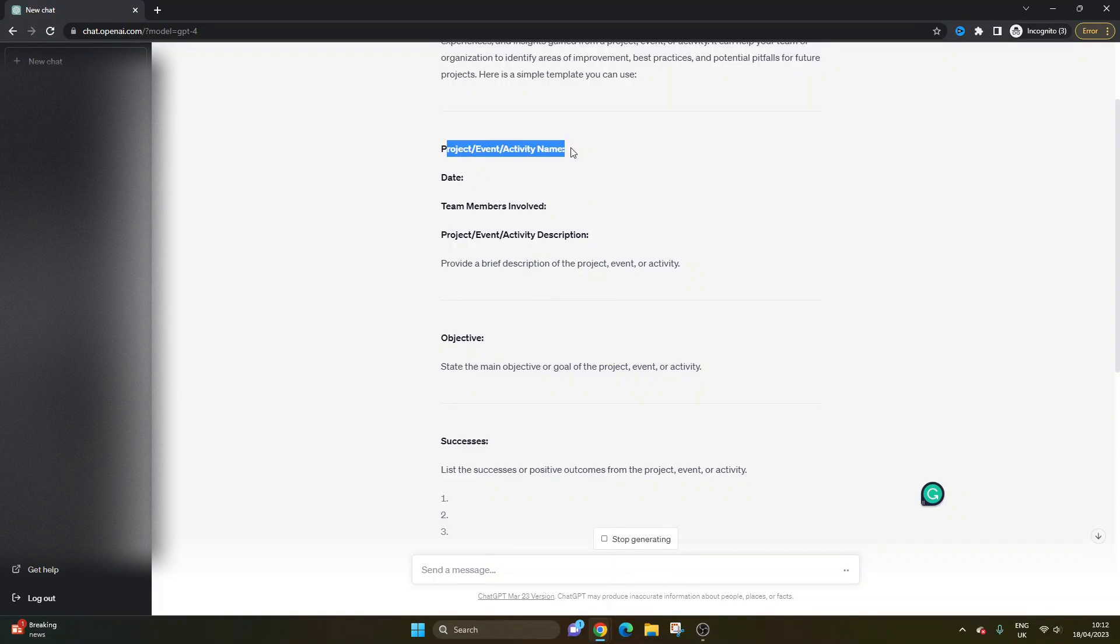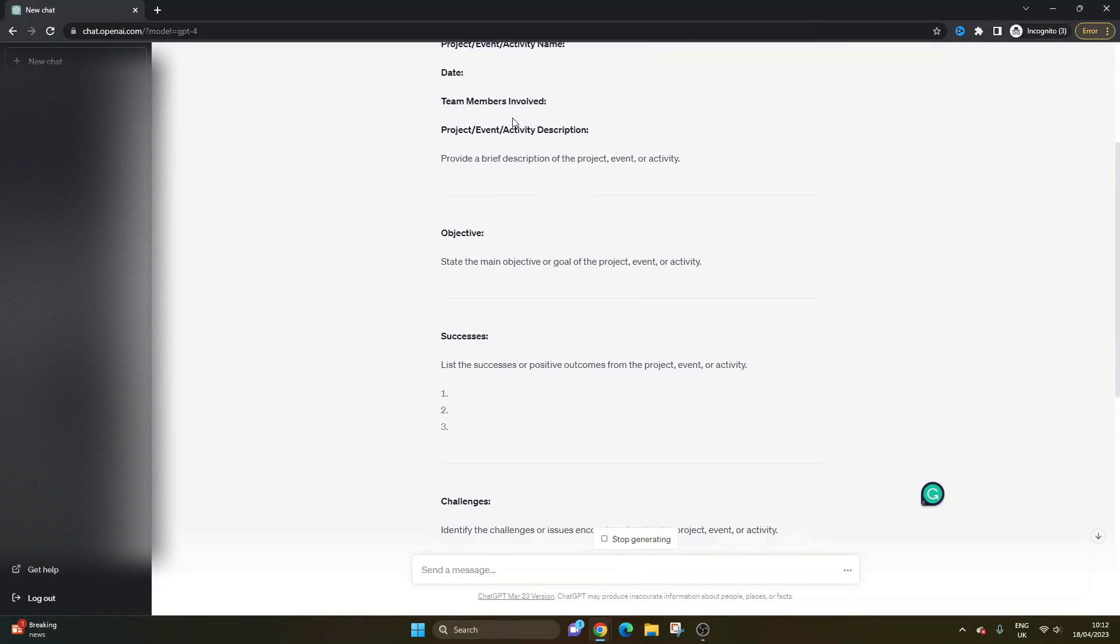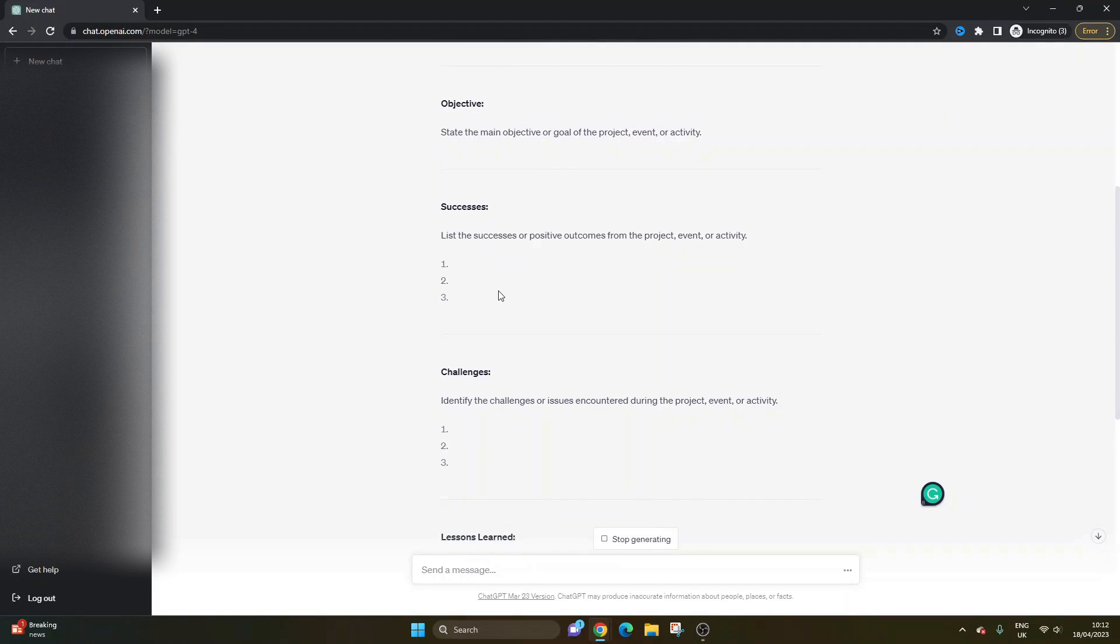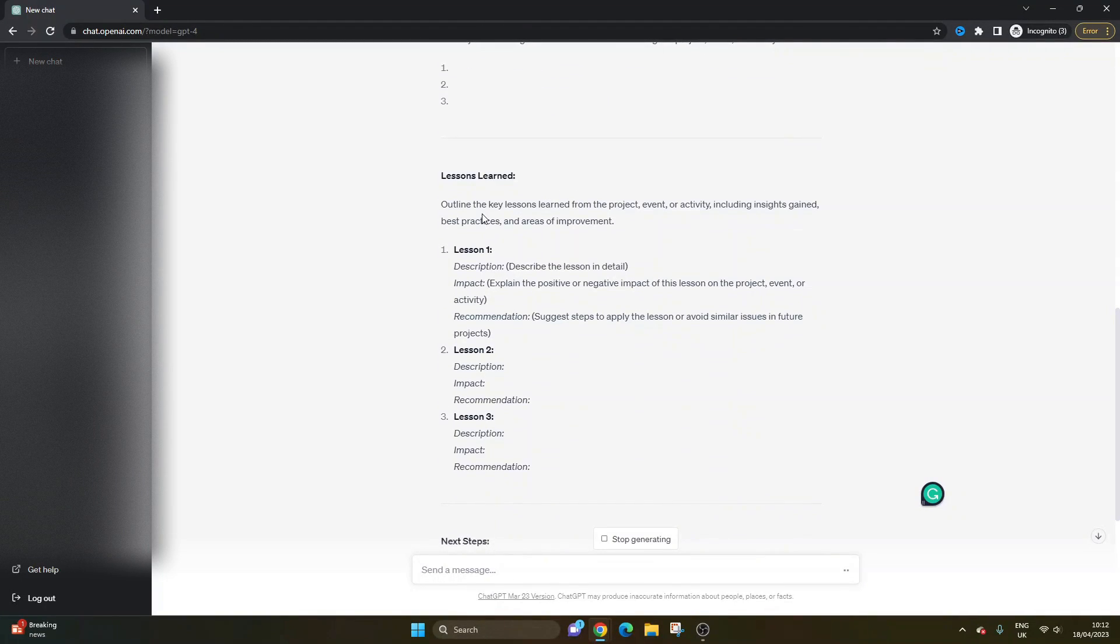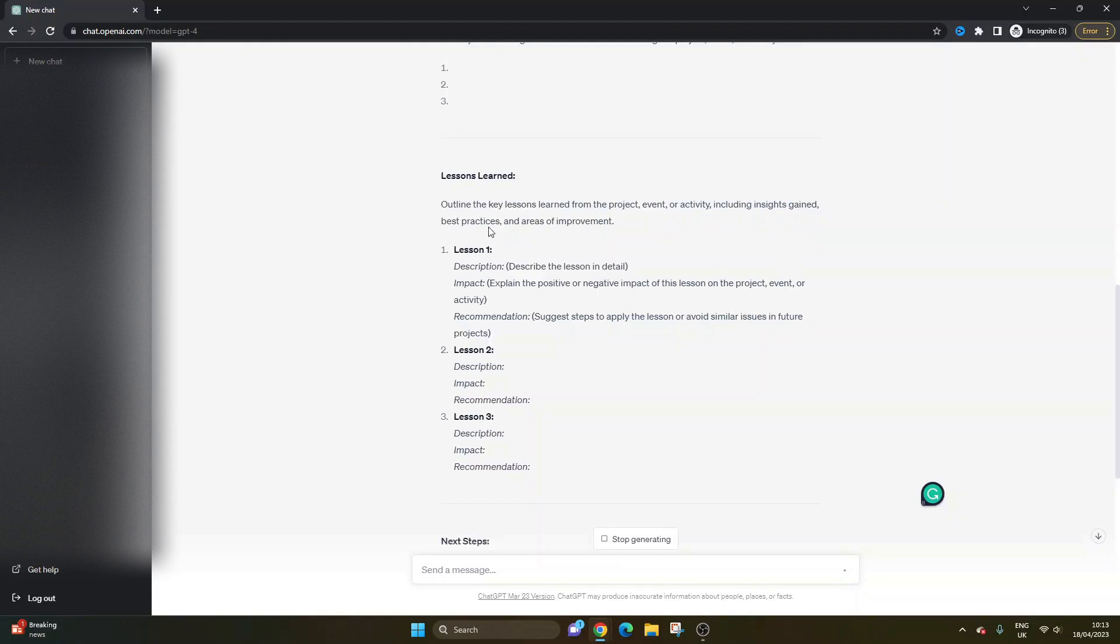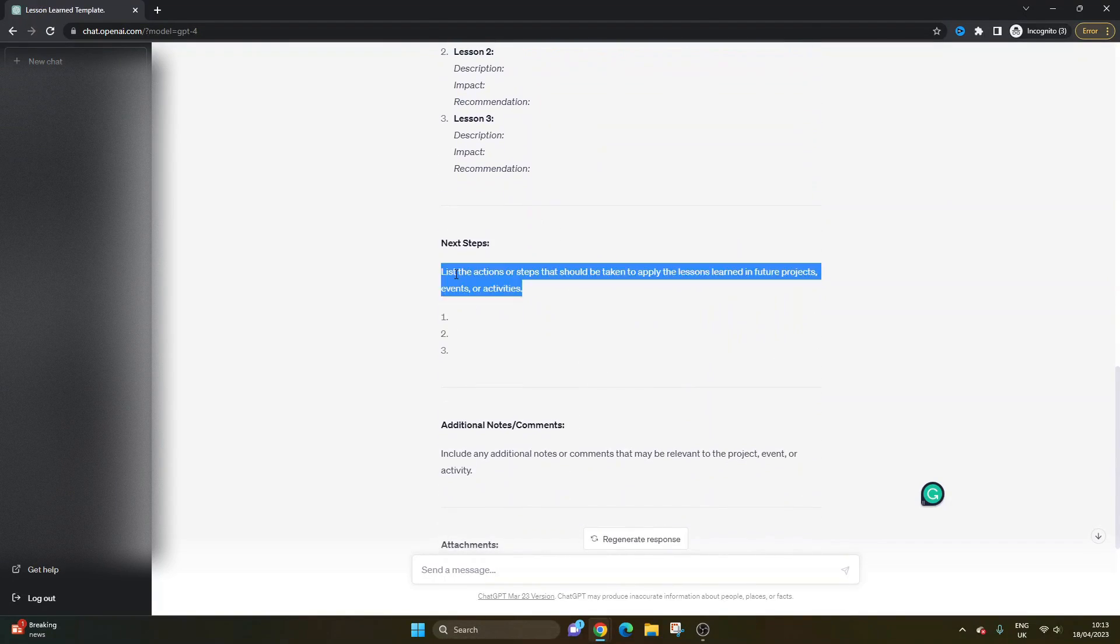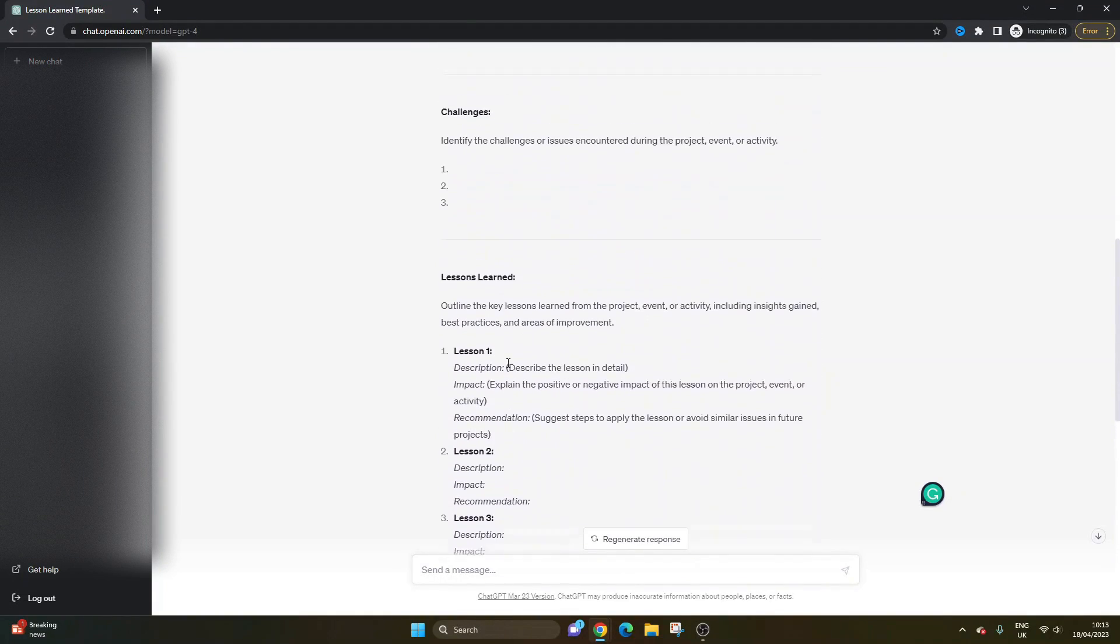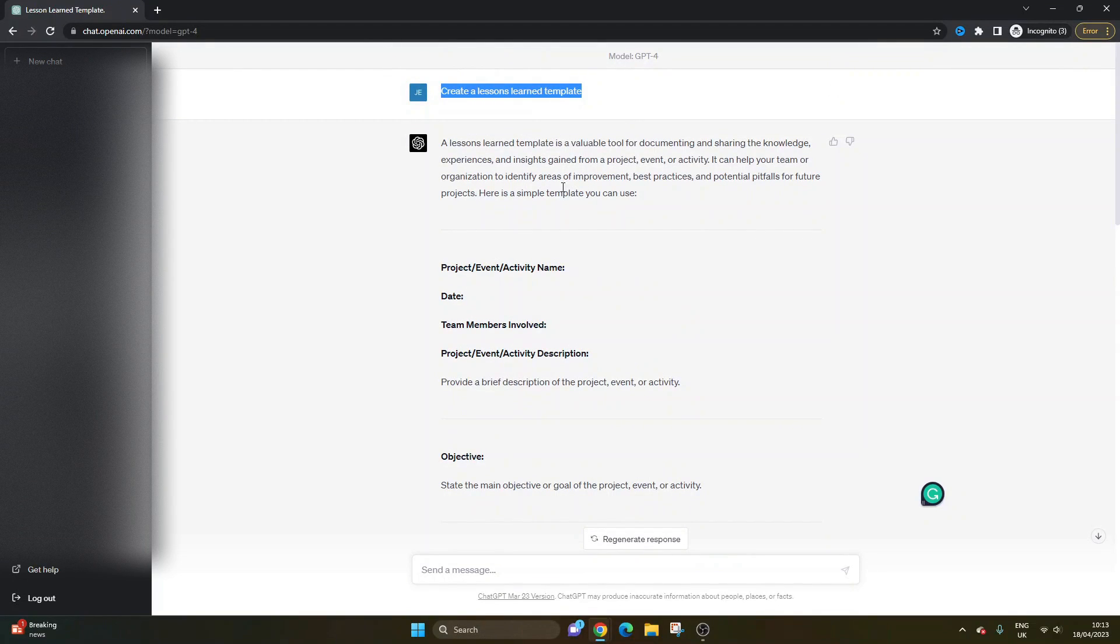Another benefit is it's actually giving us some pointers as to what to include in each section. We've got at the top we can enter the project or event or activity name, the date, the team members involved, and a description of that project. It gives us an area to put the objective of the project, to list the successes, to list the challenges, and then here obviously is the main component: lessons learned, to outline the key lessons learned from the project including insights gained, best practices, and areas of improvement. So description, impact, recommendation—really useful. Next steps, additional notes, attachments, who prepared it, and the date. This is from a very basic prompt which we can refine further.